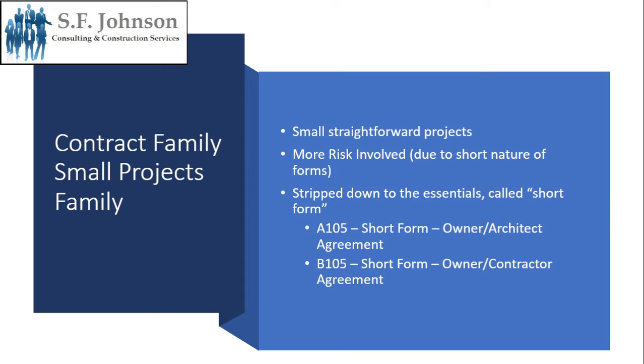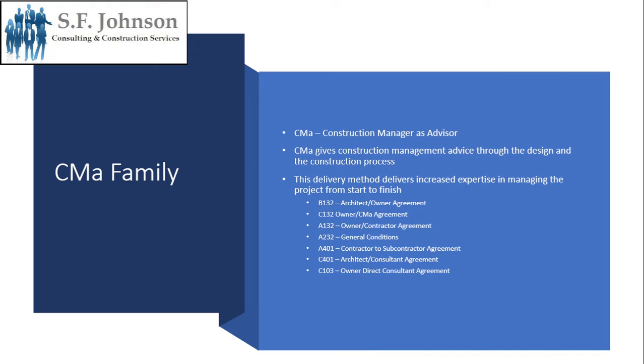Next, we're going to talk about the CMA, which is a form of delivery of the project where the construction manager is the advisor. So CMA gives construction management advice through the design and the construction project process. So this delivery method, meaning how the project is built or the way the project is going to be built, it delivers increased expertise in managing the project from the start to finish.